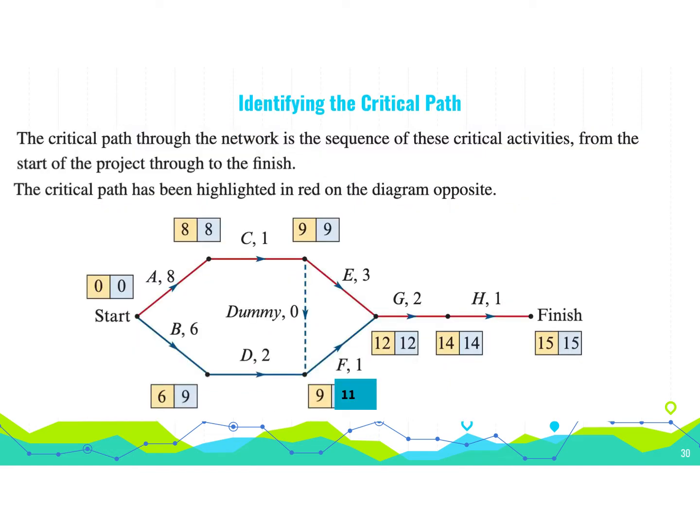Path analysis. In this case, as I said before, we're going up and we're working those out. Now another way that we can do float times quite easily is we can say that is 0, that is 0, that is 0. Here we have a 2-hour float time. Here we have a 3-hour float time. And all the ones at the top, which have the same numbers, have a 0 float time. And that will help us work out that this is our critical path. So there's a couple of different ways to work through it. I like this graphical version more than the actual table of values, but everyone is different, and so you need to choose the one that helps you.